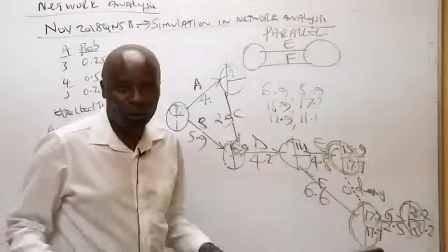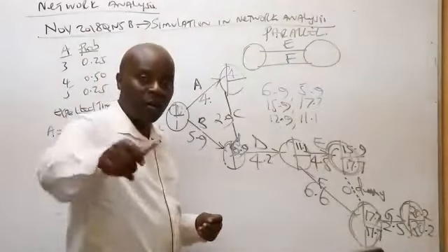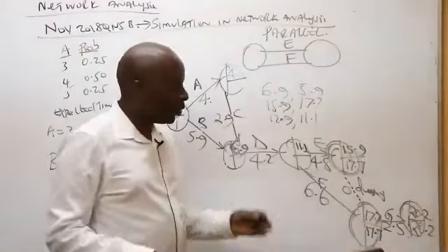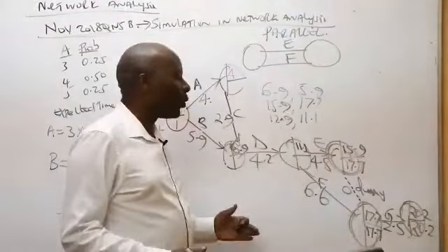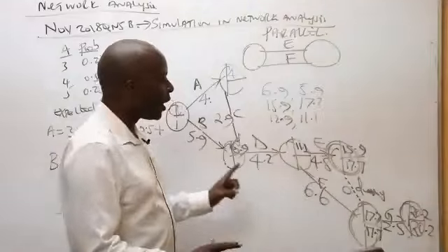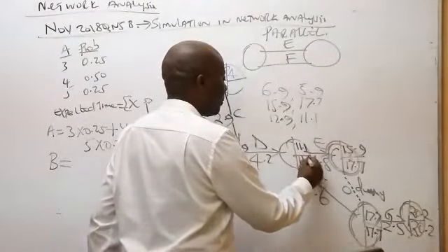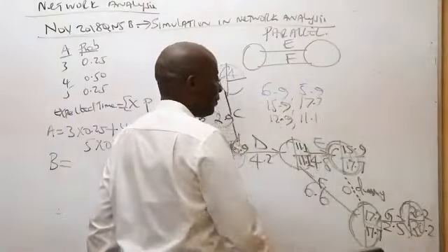a small, gentle ball. If you kick it far, you will score an own goal. A backward pass, when you return the ball to the goalkeeper, you kick the ball gently. So backward pass, you always work with the smaller. So the smaller here which will prevail is 11.1.